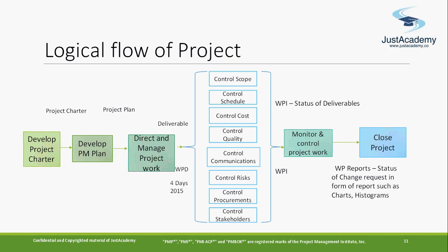So work performance data is what deliverables he has done. It's just like in this 1 week he's supposed to complete 10 activities, and he just completed 5 activities. So the 5 activities are still pending. So work performance data is just the 5 completed activities. He maybe just created 1 form, 1 website or a small form. That is the actual deliverables. That's called the work performance data.